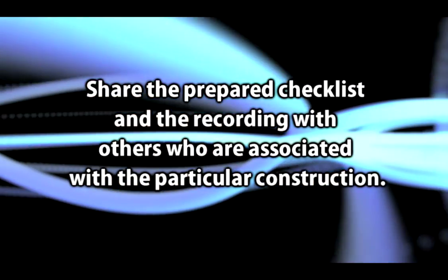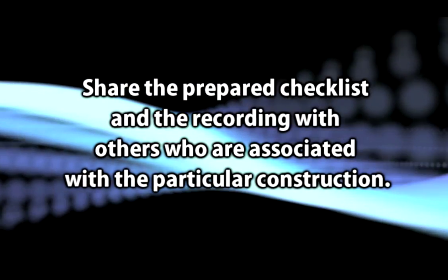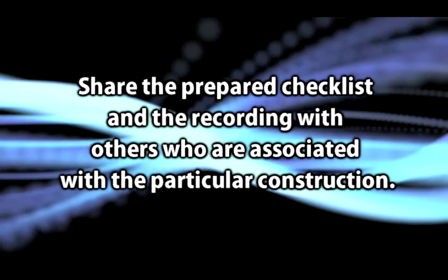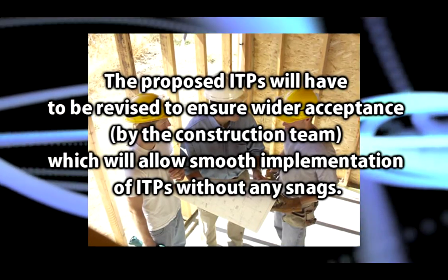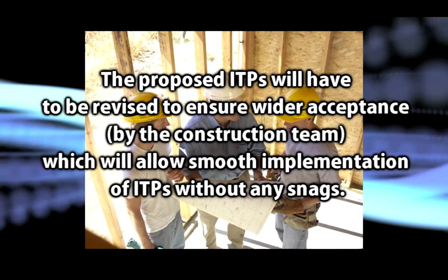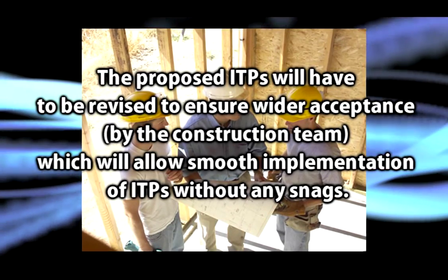Share the prepared checklist and the recording with others who are associated with the particular construction. Based on the positive and negative inputs given by the construction team, the proposed ITPs will have to be revised to ensure wider acceptance by the construction team, which will allow smooth implementation of ITPs without any snags.